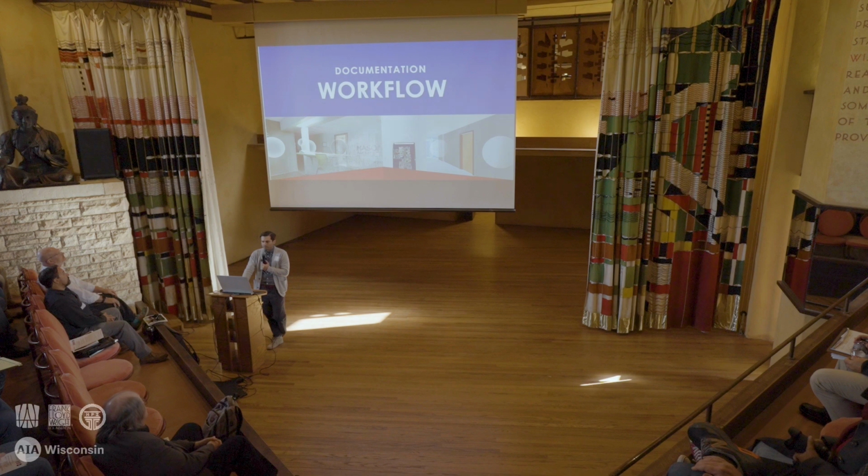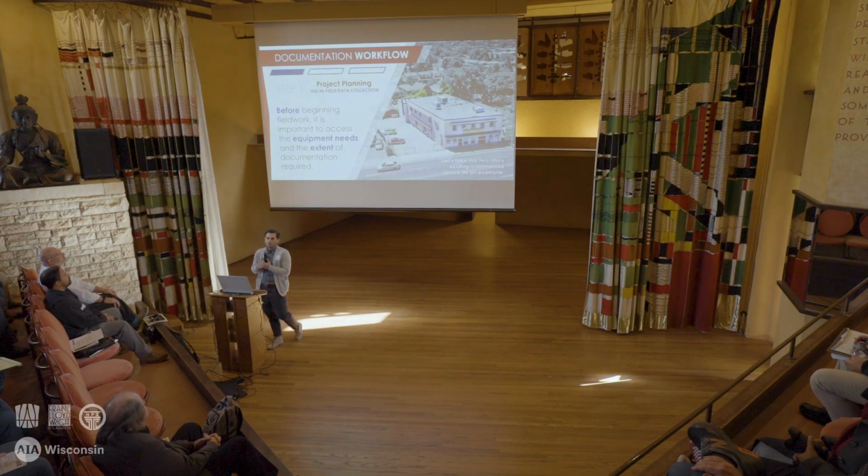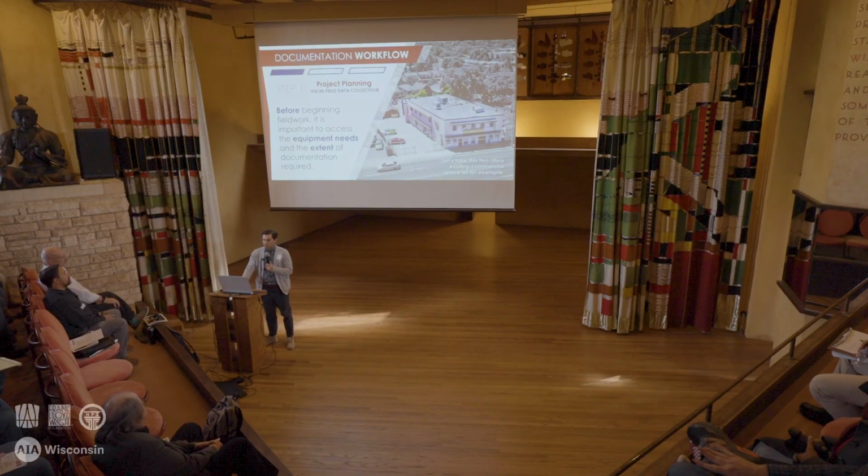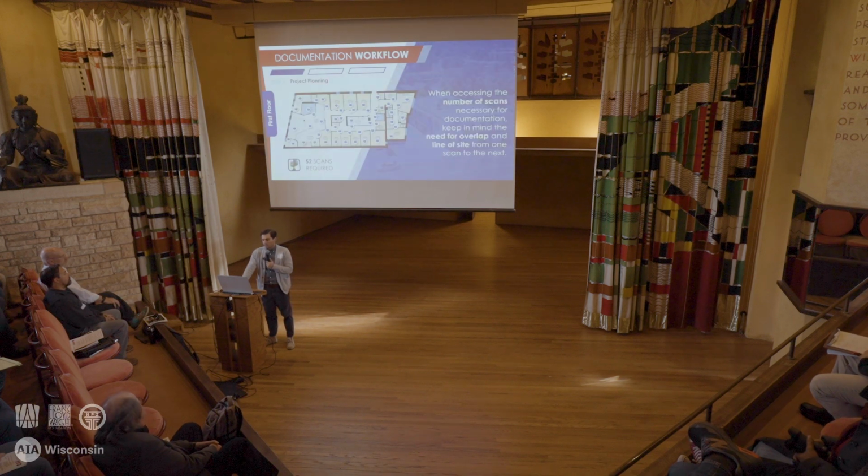So inevitably, a lot of people's question is how much does scanning cost? And really what it comes down to is the number of scans, both the number of scans dictating how much time you're spending in the field collecting those scans, and then how many scans you are tying together in post-processing. So the makeup of the square footage that you're documenting is oftentimes a dictator of that factor of time.